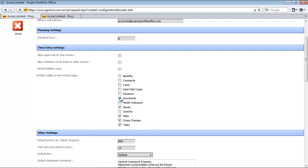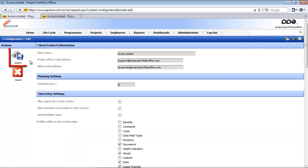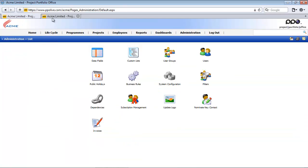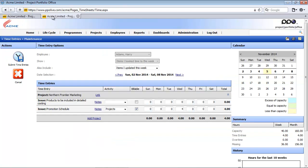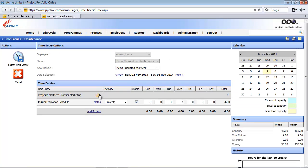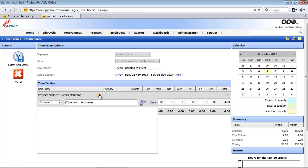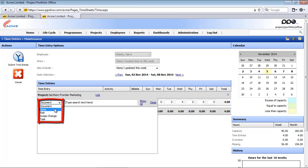So you could select those entities and I'm just using documents and scope changes as an example. Then submit and if I return to my second tab and I simply refresh here and I want to link another item, you will see here that I can now also book time against a document on that project, issues, risks and tasks by default and then a scope change on that project.